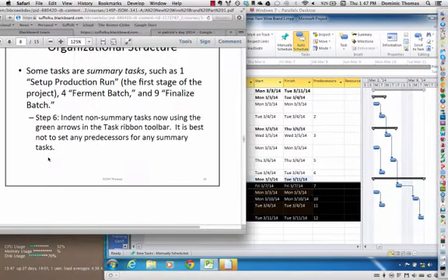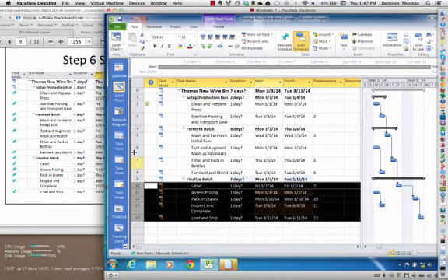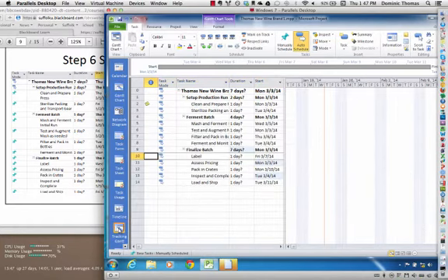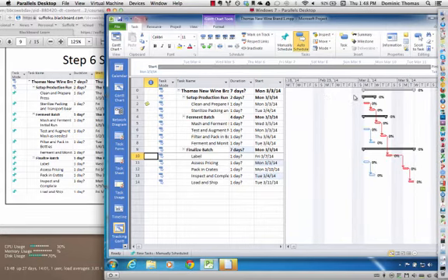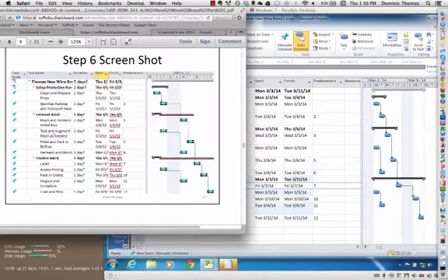All right. Now if I come down, I see that it's there. This particular view is the tracking Gantt. So if I want to see it more like this picture on the side, I can scroll over to a different Gantt view here. And it's actually showing me in red the critical path of this project, the longest path, the one that's determining how quickly this project can get done. So I'm going to switch back to the normal Gantt view, and we're going to go ahead and keep looking down.